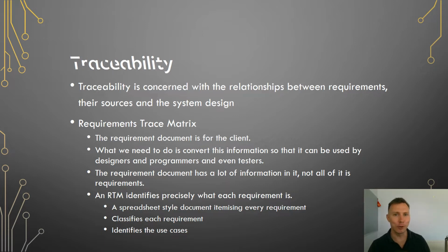The PMBOK uses the term requirements traceability matrix, but in our school we call it the requirements trace matrix, but it's the same thing. We write the requirements document for the client as part of our contract to what we agree to. We create the requirements trace matrix for the designers, programmers, and testers. The requirements document has a lot of stuff, but not all of the requirements. The RTM identifies what each requirement is.